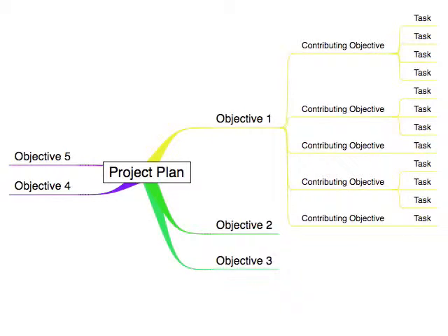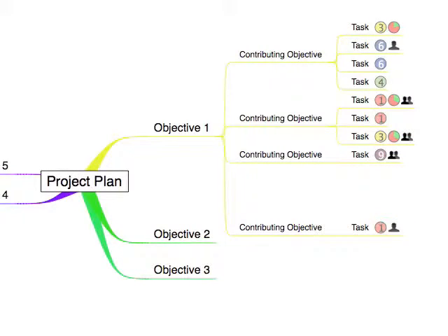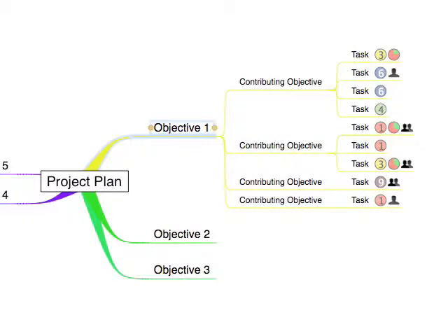Then you can do the assessment of the ideas and objectives and make sure that the ones that you want are retained, and then look at the budget and time constraints and go through a scoping exercise. Mind maps are a great way to manage project scope because you can remove a branch or sub-branch without impacting the other branches, and you know that it takes the appropriate tasks and resources with it. This makes it easy to make sure that there's nothing forgotten in the early planning and scoping parts of the project, as well as being a great tool for presenting the project to all the stakeholders.